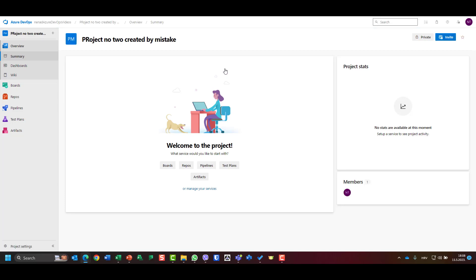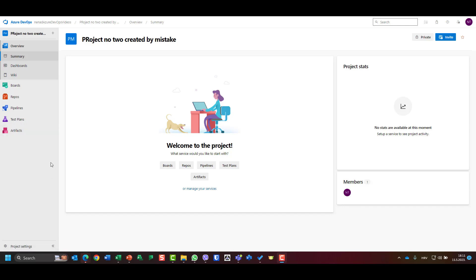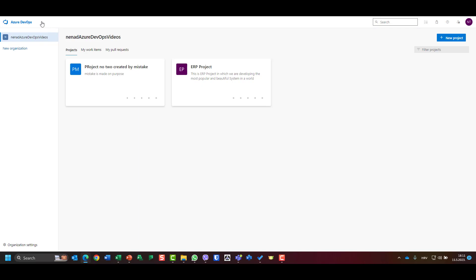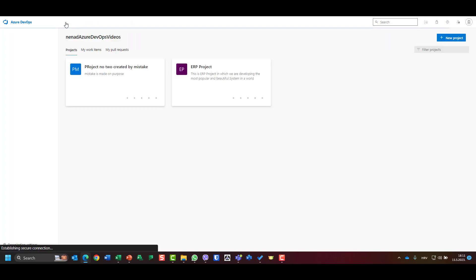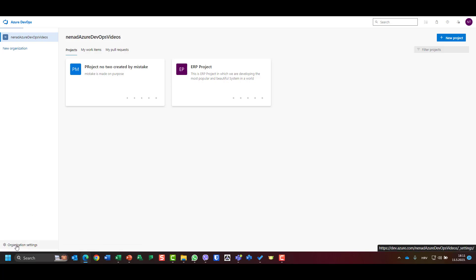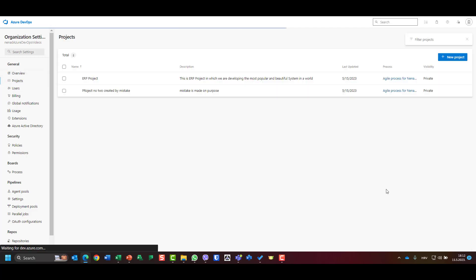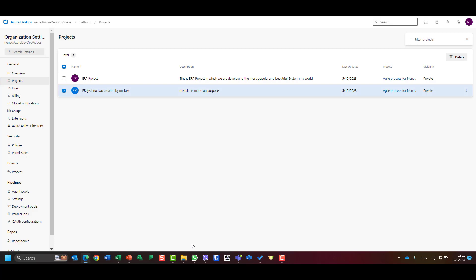To delete the project made by mistake, that cannot be done from within the project settings because you need administrative rights. It is not part of project settings — it is part of organizational settings. I'm going to choose my organization. From within a project, I can always go to the hierarchy, then navigate to my organization and go to organizational settings, then under General choose Projects.